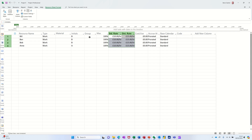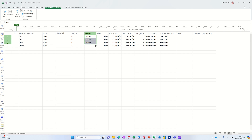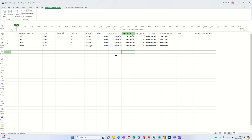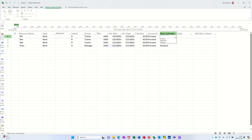Now let's say Ann's a manager — you can do little groups here. So if I go 'trainer', that guy is a trainer. Let's make all three of these guys trainers, and then she's a manager — give her some more money, she can be on £11 an hour. You've got base calendars — everybody's on the standard calendar, but you've got 24-hour and night shift as options. You've also got a code field if you've got a cost code to allocate.